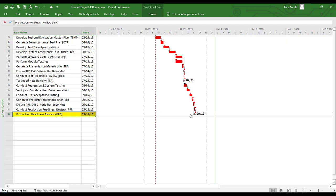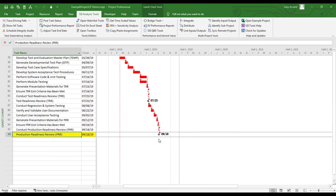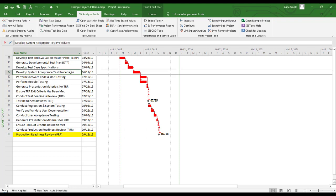These are the tasks that are determining the current September 18th date. If my team needs to accelerate the September 18th date for Production Readiness Review, they'll need to address the schedule for one or more of the tasks that lead up to that date. Working with my team, we can pick one or more of these tasks, accelerate its duration, and see what effect that has on Production Readiness Review. If I'm working in another section of the schedule, I can repeat the trace to Production Readiness Review no matter where I am by selecting the option named Quick Trace to Last Task. This will repeat the trace regardless of the task I currently have selected in Microsoft Project.